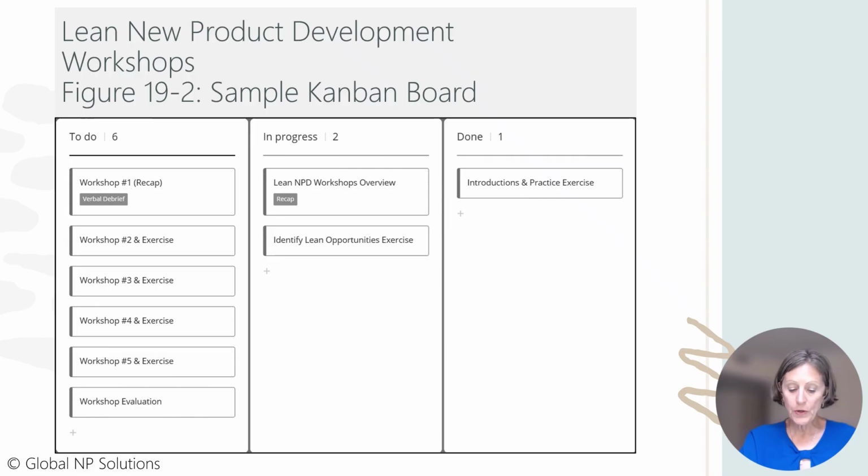In our experience, we have found burn down charts to be more effective than burn up charts. Teams are motivated by what work is left to do. Burn up charts may inadvertently give the impression that time or cost are not strictly limited, since these variables can continue to advance to the right and upward on the graph.